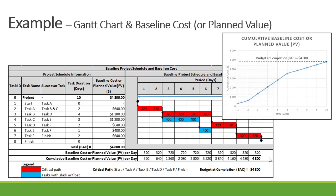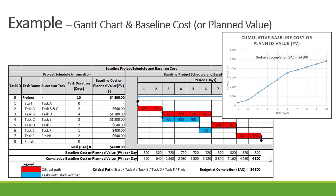Let's look at our chart — the cumulative baseline cost, or planned value for the project. That is the blue line, showing our cumulative cost with our budget at completion at $4,800.